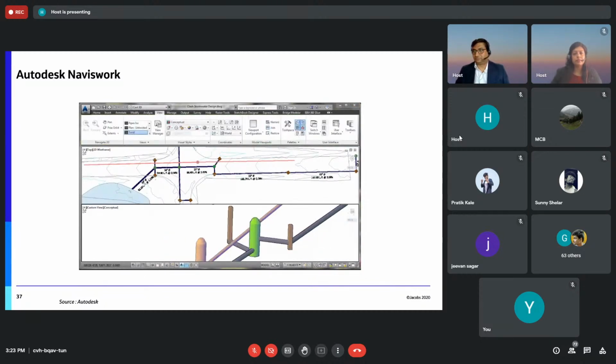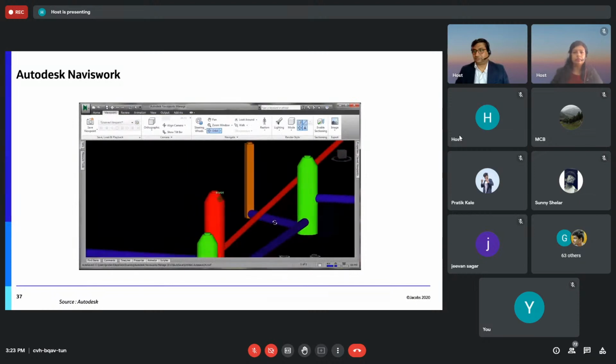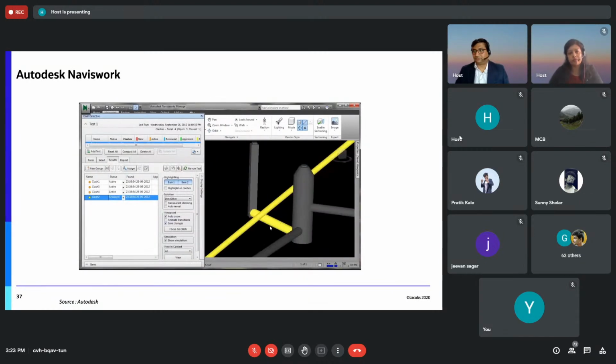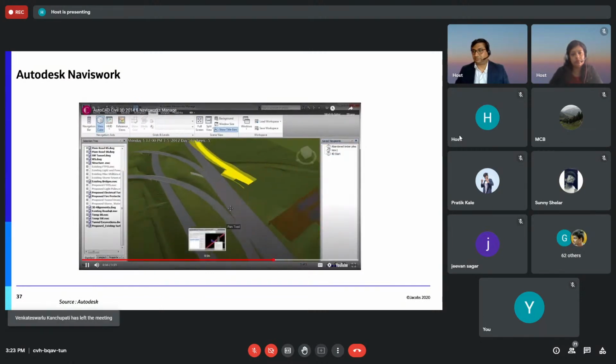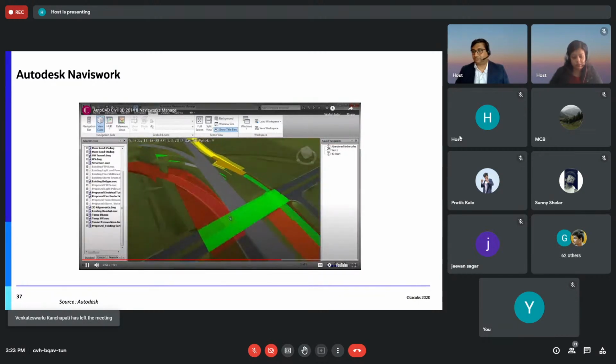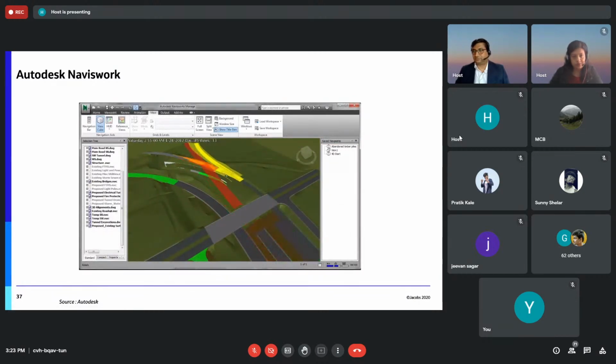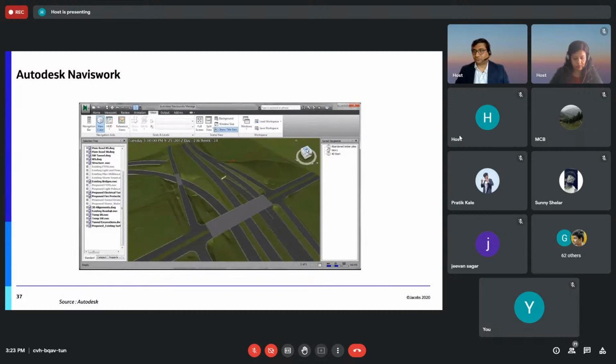With improved coordination between designers and construction teams, the volume of time and cost-intensive change orders may be reduced. When it is time to break ground, enhanced 3D models can be used to sequence construction activities and guide construction equipment. With help from Autodesk Navisworks products, project engineers can visualize 4D sequencing to help improve staging and scheduling, and to better direct field teams. This can help speed project completion by reducing idle time for workers while helping to better predict leasing, maintenance, and fuel costs for construction equipment.